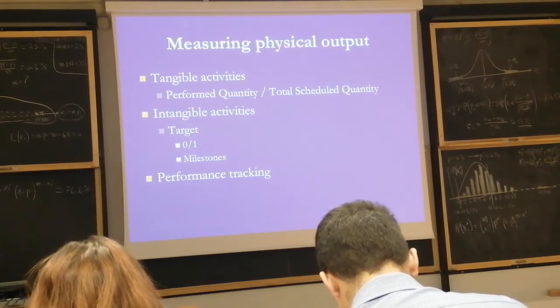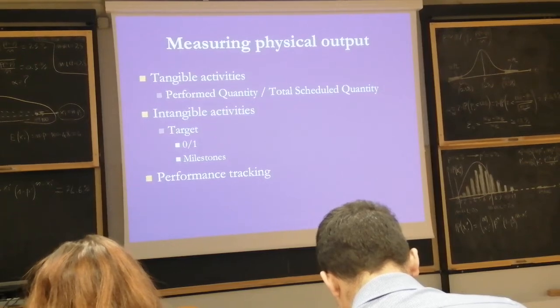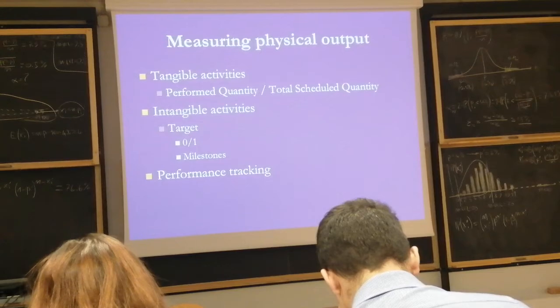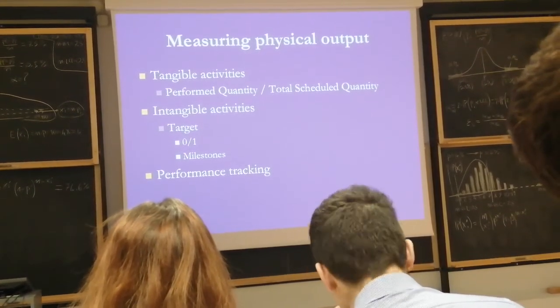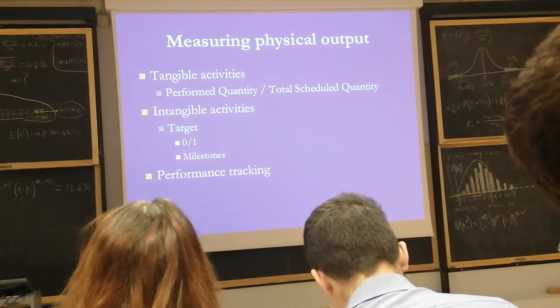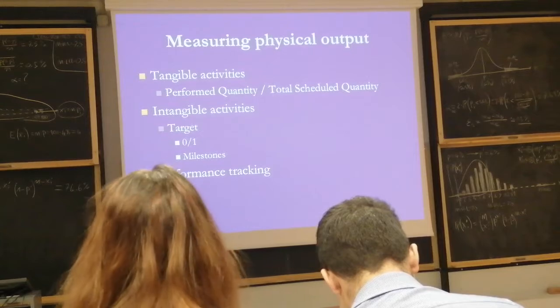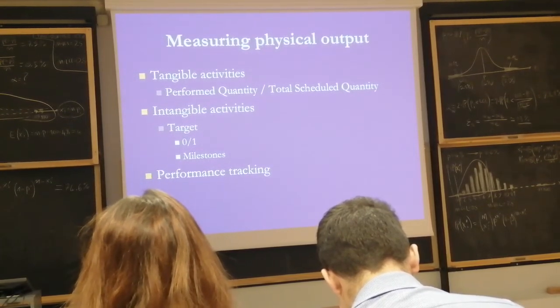So let us define what 100% means. Once this has been defined, such as undergoing a quality check, then when it's quality checked, it goes 100%. Or when an inspector approves, there should be a signal that done is done. When we have defined the definition of done, then we can measure 0, 1 easily.